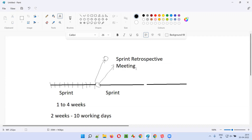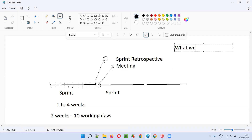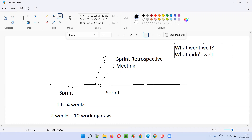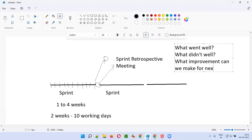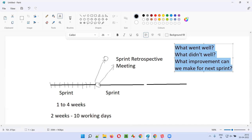What will happen during this meeting? In this meeting, the scrum master, the scrum team, and others will discuss: what went well in the previous sprint? What did we do better? What didn't go well — what didn't work out for us? And what improvements can we make for the next sprint so that the same mistakes don't happen and we get a better output? These are the three main questions discussed during the sprint retrospective meeting.